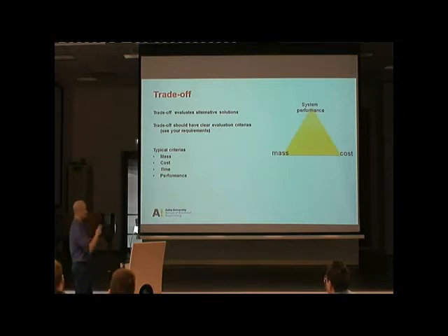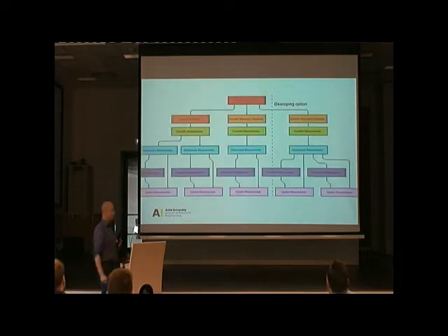If you don't keep your track record on these kind of decisions, you say, okay, this part is so big anyhow, so let's cut it smaller, make another design here, and afterwards you come back, oh crap. We made it smaller, but it seems like we had actually a good reason for keeping it bigger. So that's why you should keep track of your decisions and your trade-off tables, and you should keep and document your trade-offs during the mission.